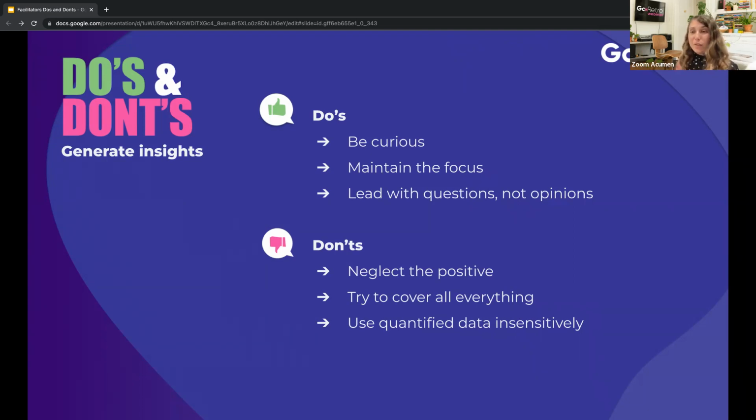And in any case, even if you're not using these features, if you want to add this data, make sure you do it very sensitively. Try to focus on team statistics rather than the individual ones, and add context. So if, for example, we mentioned that we only did 30% of what we actually planned to do, right? So actual versus planned was only 30%. It sounds terrible, and it can really shut off people when talking.